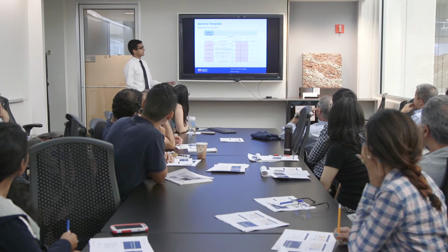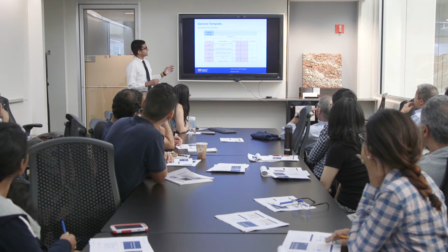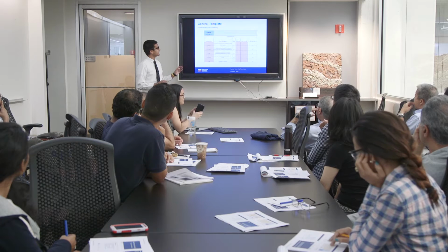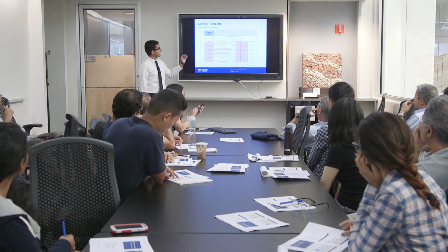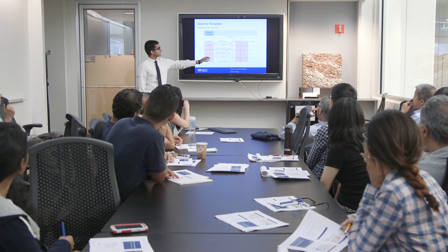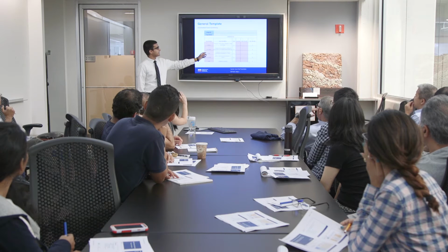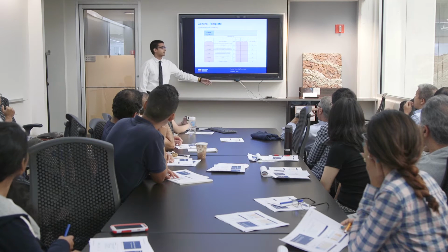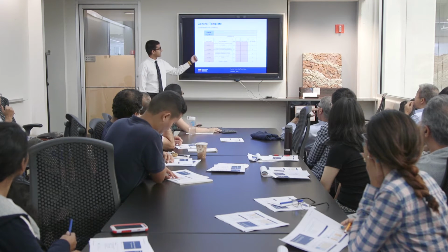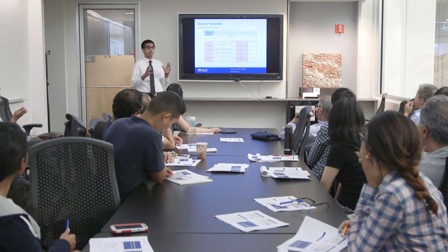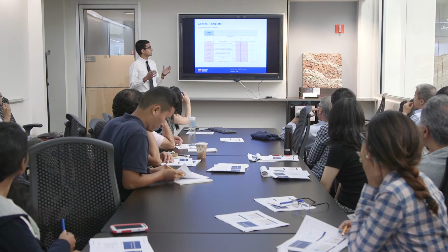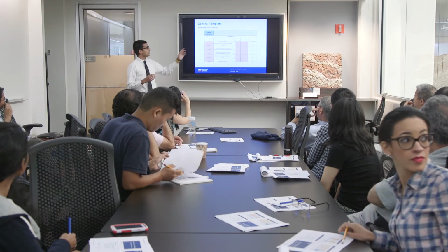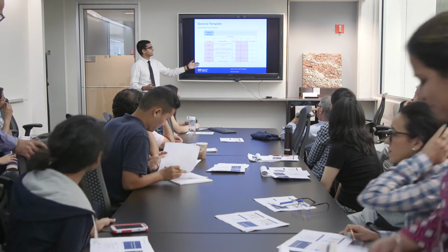Next, I have a summary chart for the same spreadsheet. The output in this file is, again, the item description and the units. However, we have to input the item number and the quantity and the unit price once again. So suppose we have to estimate how much total steel faced concrete curb we need for a specific project. We would input the quantity and the unit price to get the exact price.